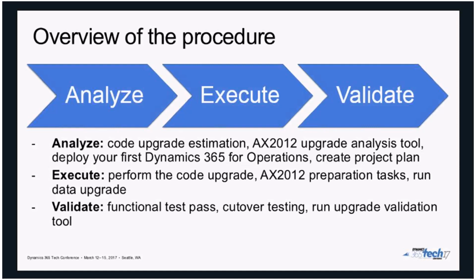Is it consistent? Do we have all the element IDs and similar things in the right place in order to start your actual upgrade process? So that's the first thing you have to do. You have to look into your current database, into your current code, as well as see if it's ready to be upgraded and do necessary adjustments, purging and data corrections in order to prepare your database for the upgrade.